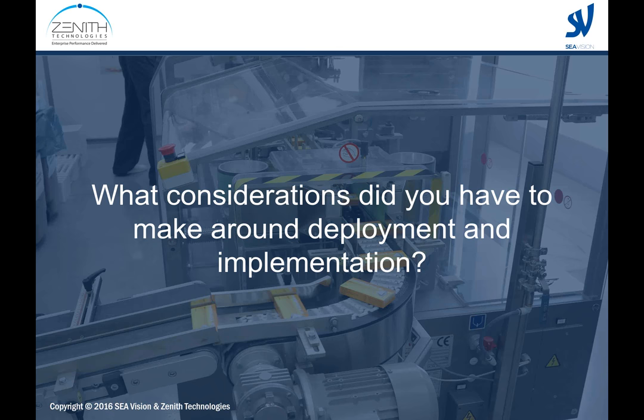And so their technicians are expected to run all over the world, potentially installing the system in many places? Or is there something here about using a core central team within your company, perhaps drawn from your brightest technicians from your various packaging sites to do the deployment work? Because in fact, it will be them who do the support in the long run. So there is some benefit to be gained to making sure that your site resources are well involved in the deployment activities.